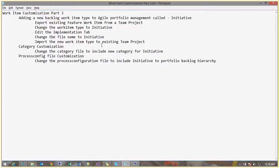We'll export the existing Feature work item, change the work item type name to Initiative, then edit the implementation tab of this work item to include Feature as a child of the Initiative work item type, and import it back. This handles customization for the work item itself. For the work item to be available in your backlog page and agile planning tools, we also have to change the Category and Process Config files. We'll see what to change in both.